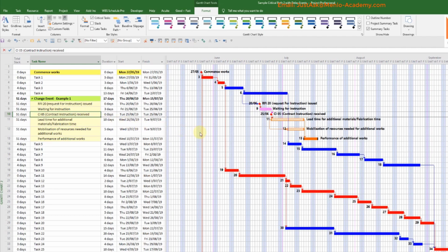So the resources you have on site, the excavators or whatever, are 100% committed to carrying out the works under contract. So any additional work requires additional resources, and you can't immediately ring up and say, I want a 20-ton digger here in the next 10 minutes.